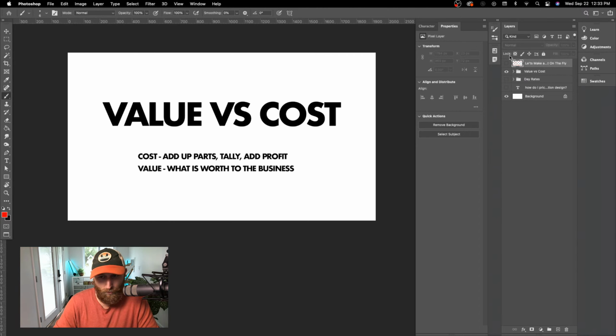But if it's a TV commercial, if it's a logo animation, which I've done a lot of, logo animations are where I will do a little bit more value-based pricing, because I know that element is going to be used over and over and over across various videos, TV ads, other things like that. The way I like to do value-based pricing is just to dramatically increase the profit margin. Let's say it's going to take me 15 days to do all the different versions they want to see and all the exploration. So there's some fee for my time.